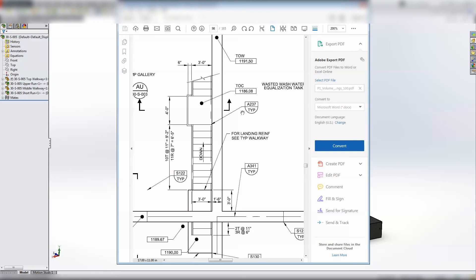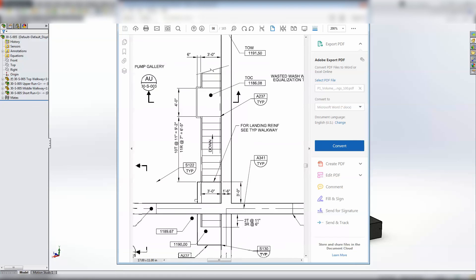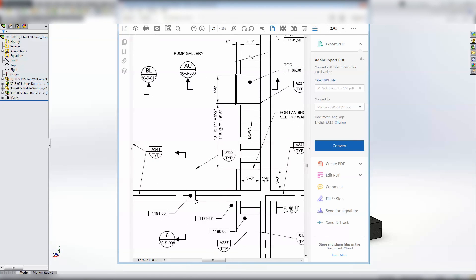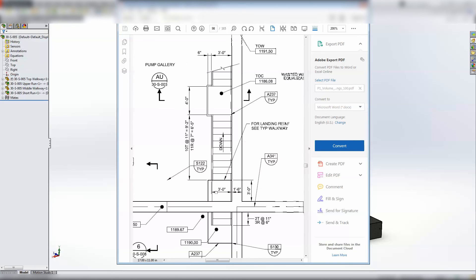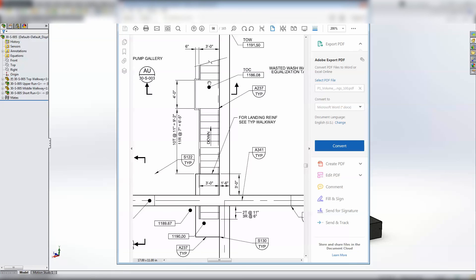I didn't notice it till quite a ways into the drawing, and then I started checking these elevations. I wasn't sure if top of wall here was maybe not the landing, if they were gonna have another step over the wall. They weren't very clear obviously because they didn't have any cut sectional views. So I had to end up submitting a change order back to the engineering firm, and they had to come back and they adjusted them out.